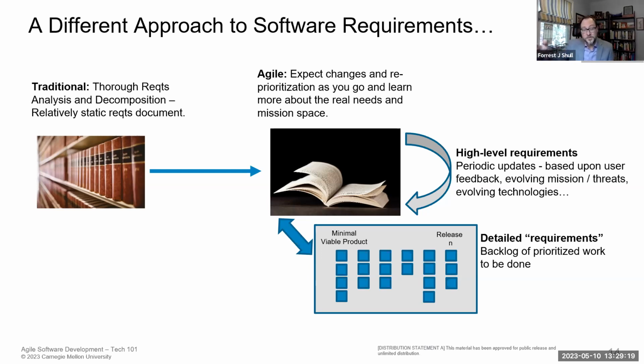Then we have a much longer string of things. There are more capabilities we know of than we can put into that first MVP, so we'll keep those on our backlog and maybe have a notional idea of when we're going to get to them. Again, we use tooling for this. As things change, maybe the user changes their mind, and when they see that first version, there's something they want much more urgently than originally thought. It's very easy for us to reprioritize these things and change that ordering without changing the whole process and the whole understanding of the technical work that we're going through.